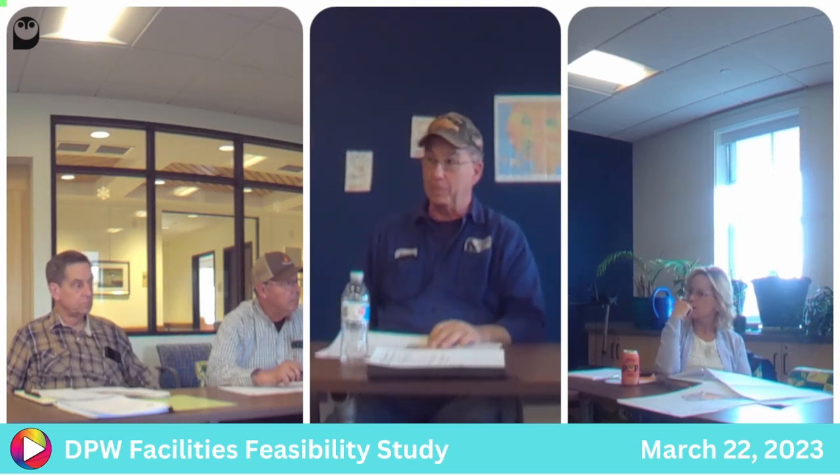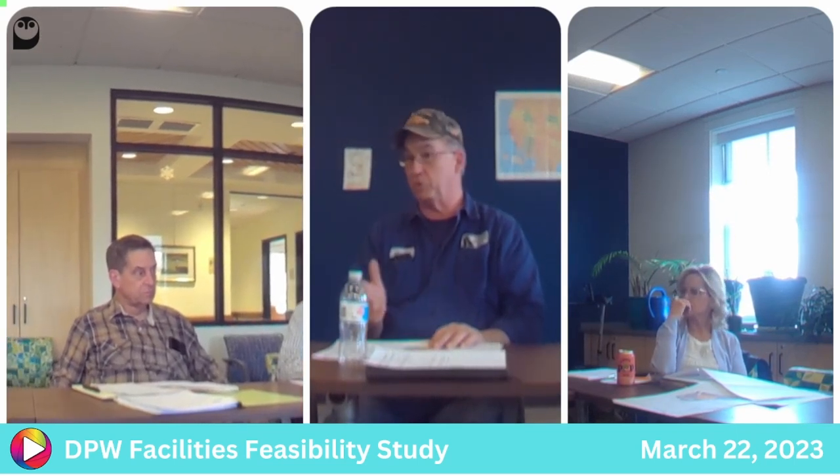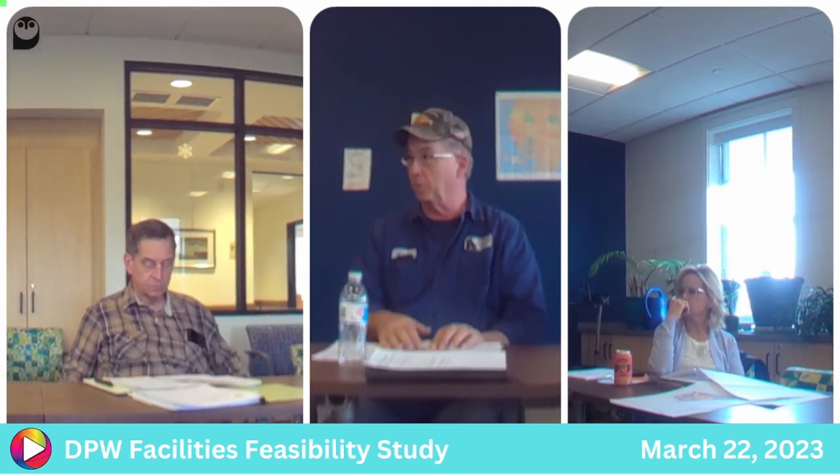The problem that everybody knows with an addition is if you plan on doing it 5 years from now, that addition's going to cost you a lot more money. And if code changes or something, they're going to have to go back through this brand new building that's 5 or 10 years old and upgrade everything you just did to meet new code. Well, you were speaking 100 years, so I was hoping we had more than 5 or 10 years to plan.